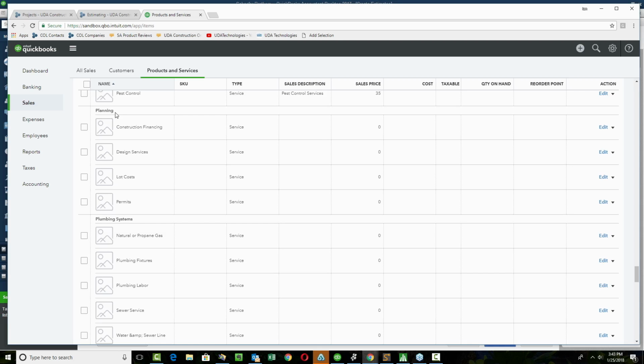Now again, the question comes up in almost every one of my sessions, and I know Ben was looking through some of the default options in there as well. If you're looking for recommendations for estimate options, the number one thing I would recommend, if you're going to be working between ConstructionOnline and QuickBooks Online, or ConstructionOnline, QuickBooks Desktop, or ConstructionSuite, our desktop application, is to provide a numbering system to at least your categories in ConstructionSuite or ConstructionOnline. That way you can avoid what Ben and I just ran into of having to scroll down to find it alphabetically in the list.